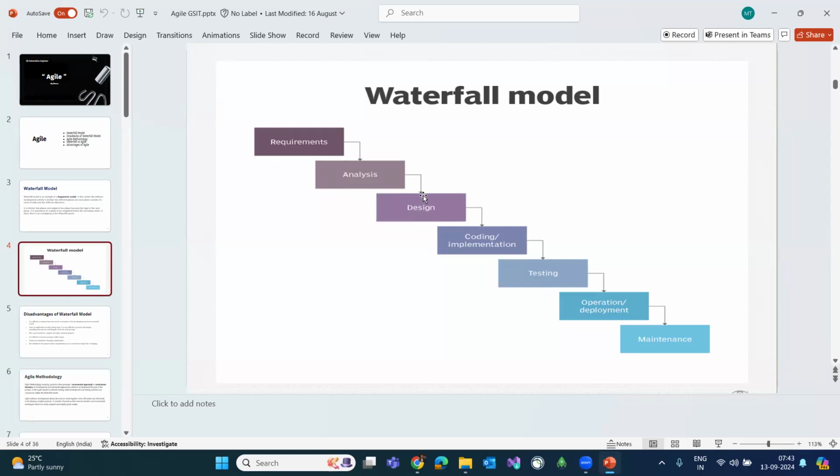That is the first drawback. Suppose we got the requirement in the month of January. Now we will analyze. For the analysis, I need around 10 days. Then for the development, they gave an estimation of 2 to 3 months. Then the testing team gave an estimation of 1 month for the entire testing. So we got the requirement in January, and we are delivering the software in September. The client needs to wait 8 or 9 months to get the entire functionality.